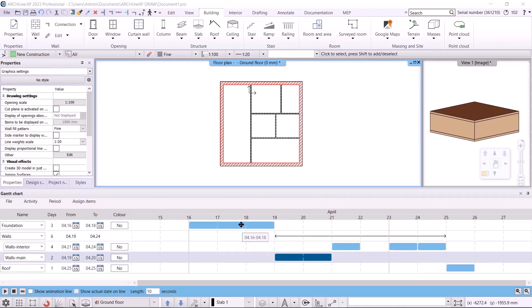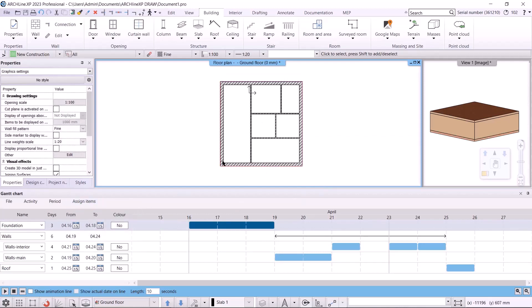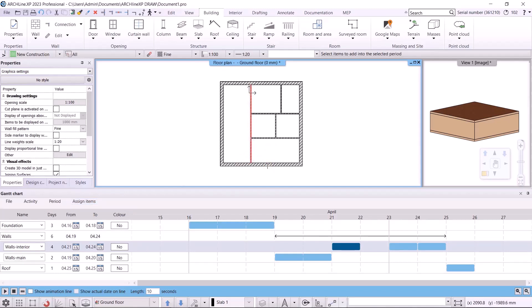We are done with the exterior walls. Next, let's do the foundation. I will assign it to the period using the second method — selecting the elements. I select the slab on the floor plan, choose the period, and then choose the command assign items, add selected items. And we are done. It is important to note that if one period lasts for one day and another lasts for 2 to 3 days, those that last longer will appear slower in the animation. Let's also assign the interior walls to the periods. I select the period, then start the add selected items command. If I select the period and then choose the command, I can specify the walls on the floor plan and then accept with Enter. This way, the program also associates the wall with the period.